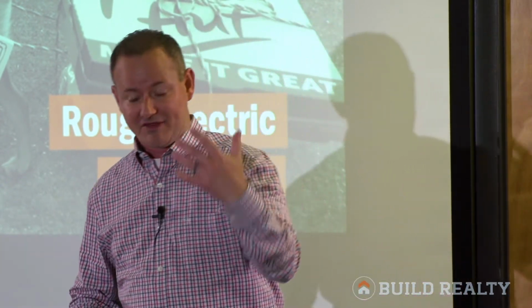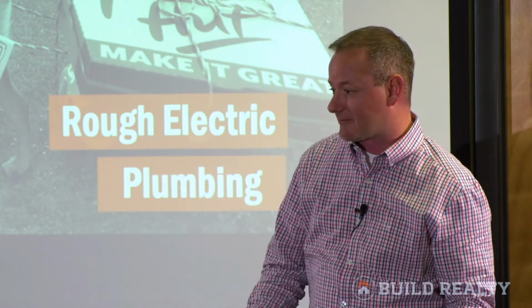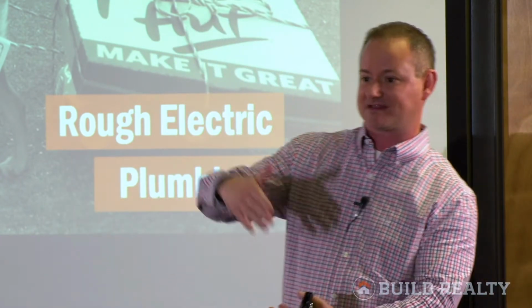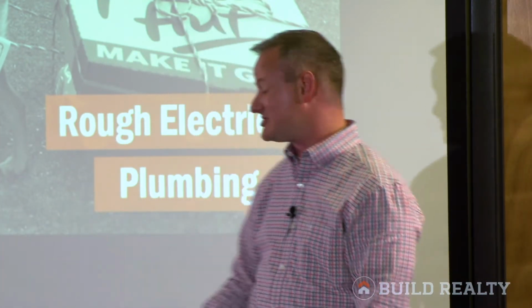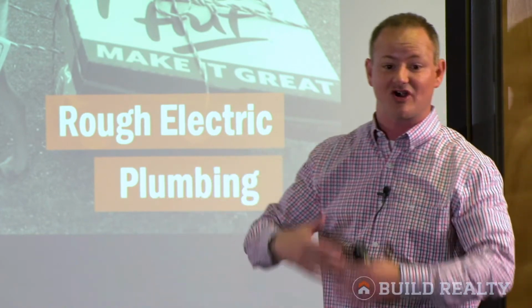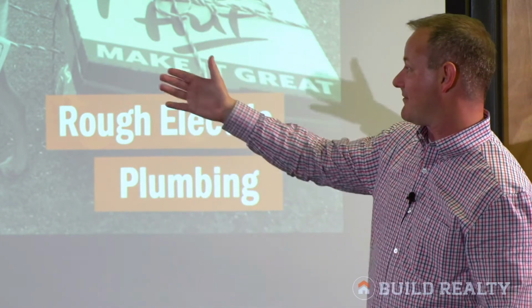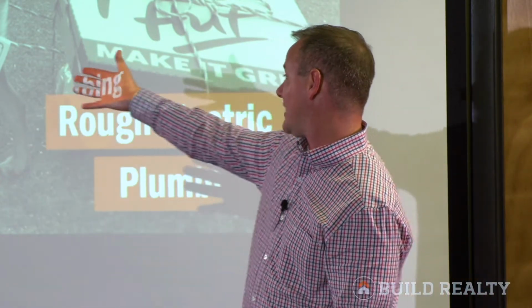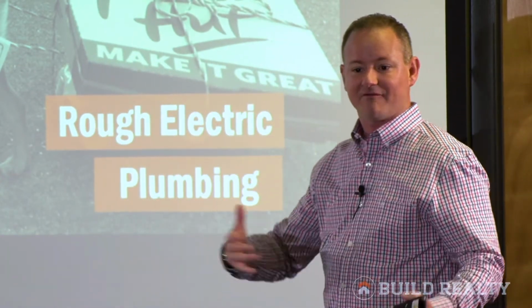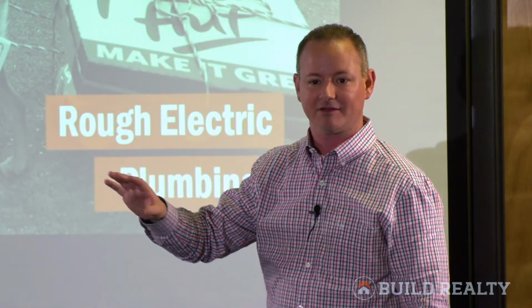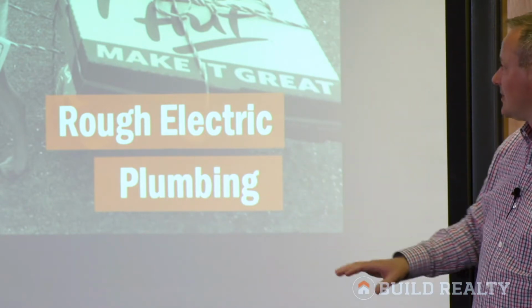So be thinking, okay, I'm going to call the person today. Hopefully I can meet with them this week. Probably it'll be next week. And then hopefully they can start the week after that. So that means you need to get on the phone right away and start lining people up, right? So you want to line up your demo people, line up the framing, line up the dumpster, get all your bids and all your stuff worked out before you close. Remember, at that time, you're playing with the house's time and the house's money. It's not free, right? Okay.